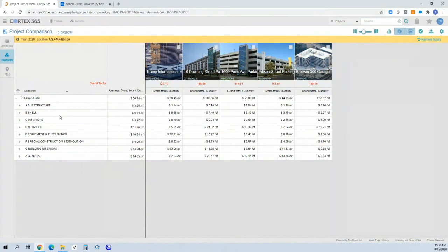However, benchmarking also is a major capability of project history systems. So let's look at a different scenario. Let's assume that I'm in an estimating department and I'm working with a client at the early stages of a negotiation, and I've produced an early stage estimate. We want to see how that estimate compares with the projects that are in my database. Many organizations will only publish projects that they consider the gold standard that users will compare to. So it might be part of your process that any early stage estimate has to be analyzed against your history to make sure it passes the sniff test.